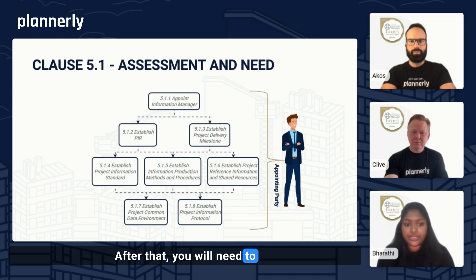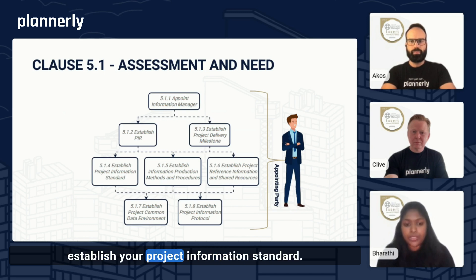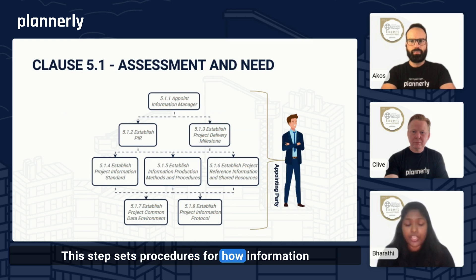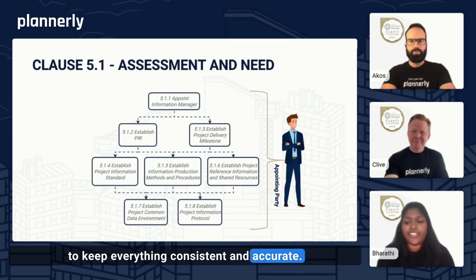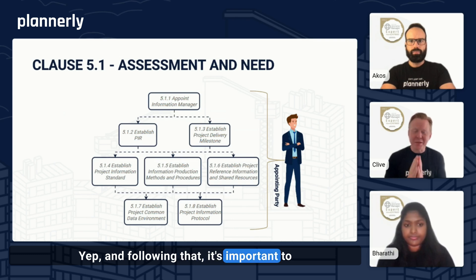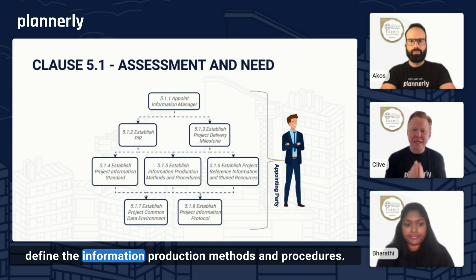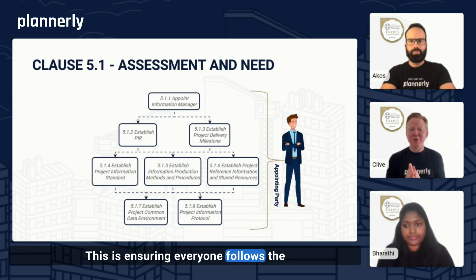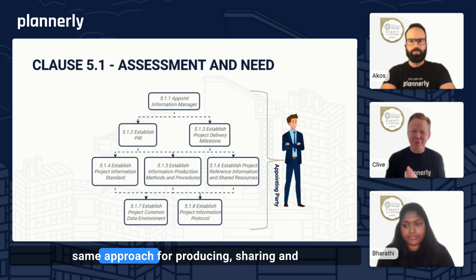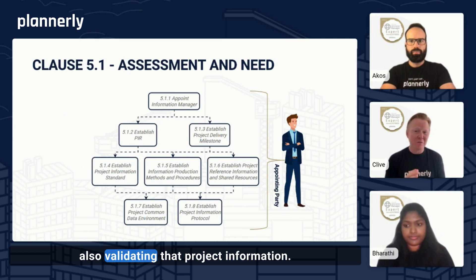After that, you will need to establish a project information standard. This step sets procedures for how information will be produced, named, stored, and shared to keep everything consistent and accurate. Following that, it's important to define the information production methods and procedures, ensuring everyone follows the same approach for producing, sharing, and validating that project information.